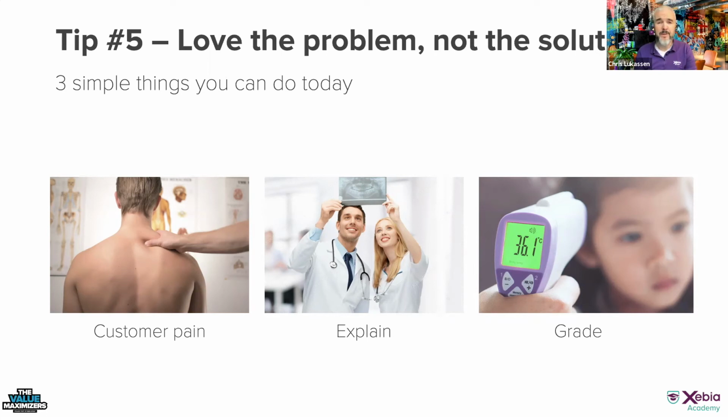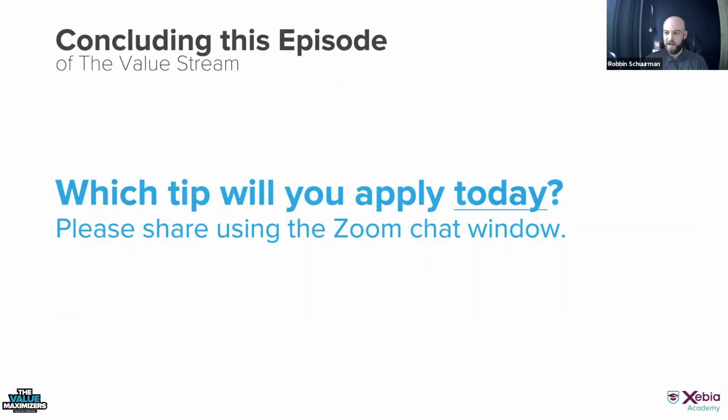Not only will it make it easier in sharing the vision, what we're trying to do here, but it will also help you in your stakeholder management. It will make your sprint reviews much more fun when you start talking about the big goal that we're trying to reach and how we're making little baby steps in that direction. And of course, don't look at those very small, tiny bugs, because if there happen to be 5 very small bugs at the top of your product backlog, maybe you should look past that. But try to see the bigger picture in your product backlog, and just give those PBIs, those user stories, a grade. Maybe on a scale of 1 to 5, how much do they actually contribute to the vision? That's something you can probably do right after the session.